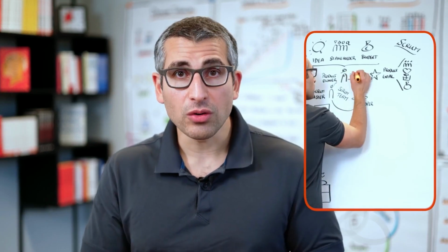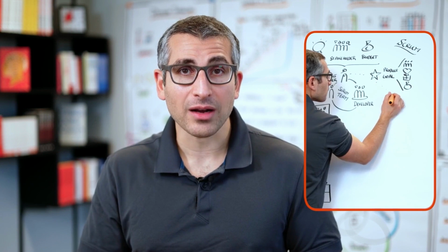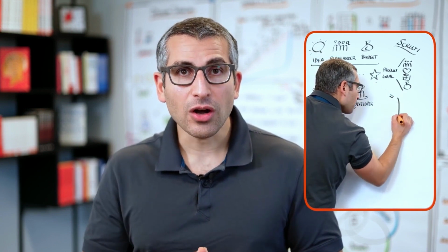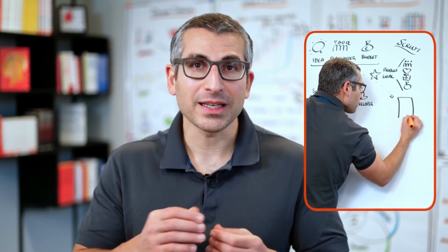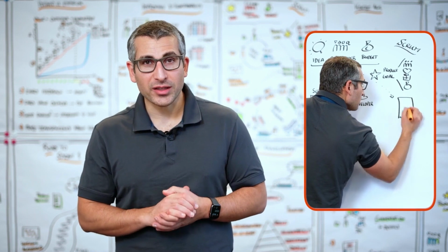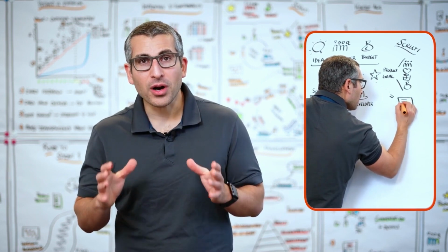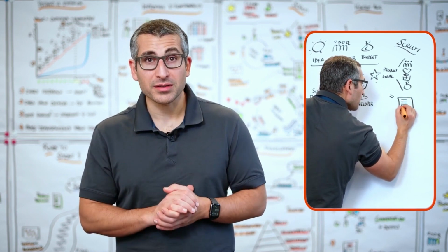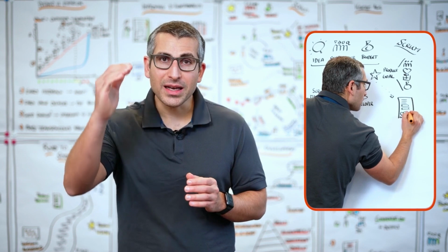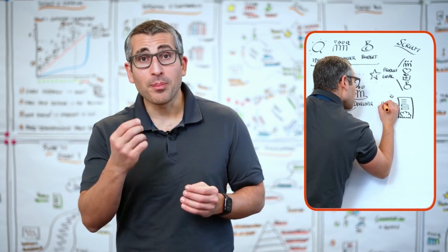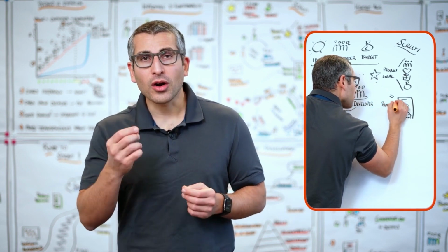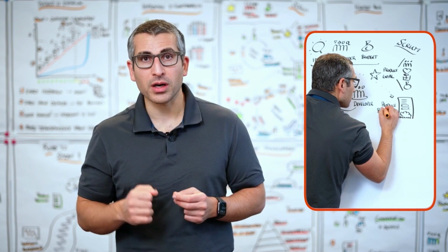From the product goal, you can create the product backlog. That product backlog, again, has 4 key characteristics. The first characteristic is that every product backlog is prioritized. There needs to be a clear order, ideally based on customer value, on how we want to build the product.